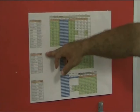Names all the people, their roles. Weeks we're going to do stabilization in, and what weeks we're going to actually do a stabilization and a drop to the client. And a drop to the client actually means when we're going to package everything up and give it to the client for their testing.